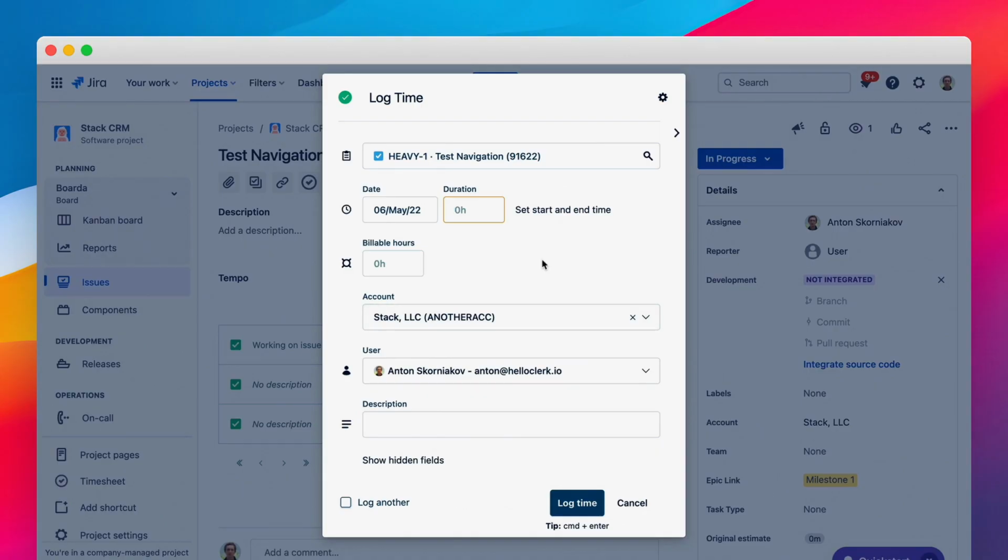And if we need more flexibility, we need to find some time tracking app that allows working with billable and non-billable time. For example, we may need to partially write off part of the logged time to exclude it from the invoice. This is how the Tempo Timesheets app allows logging billable and non-billable time separately for any task.